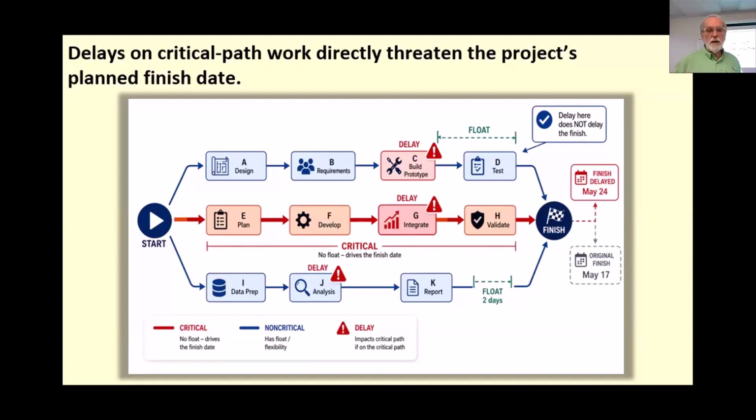And critical path awareness, in other words, when we're analyzing things, we need to be aware of how these changes affect the critical path. It helps the team distinguish between what's called general schedule activity and schedule driving activity, which is exactly what the project manager needs to know before deciding how to respond to a delay.